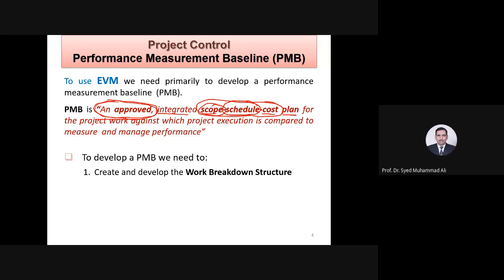So yes, Etisham, you're right. Work breakdown structure is to actually break the entire project into various levels. Various levels. It is important. Project itself is on the top level. Then you have sub projects. Then you have activities. Then you have sub activities. Then you have task. So the grassroots level will be the task, which is assignable, doable, quantifiable. So anyways, yes, this is the work breakdown.